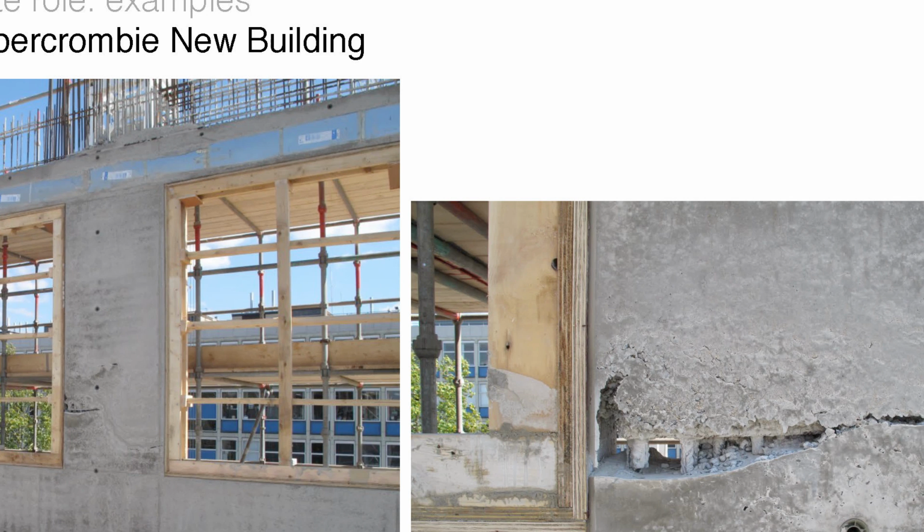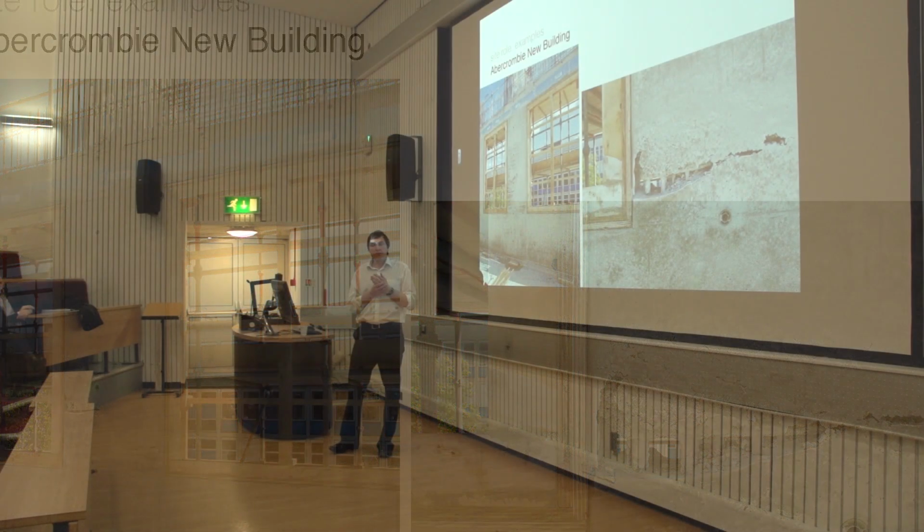The first leg of the lecture theatre that they did cast, they left the formwork on for probably about a week, and when they took the formwork off, it looked brilliant. Then over the next couple of weeks they found that the textured concrete was coming away, and we were losing all of the texture, it was kind of powdery, just flaking off, and that was down to leaving the formwork on too long. And that section of concrete, which was a big wall, they did take down.